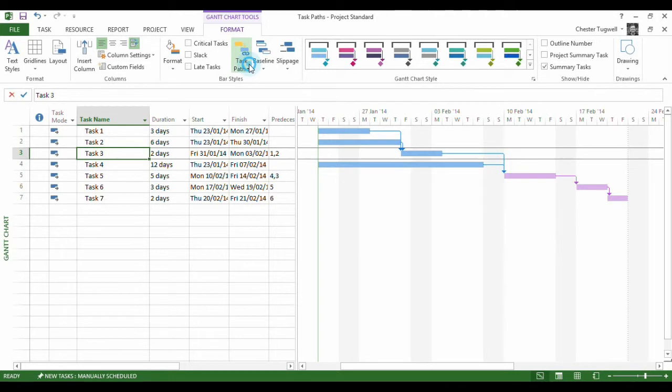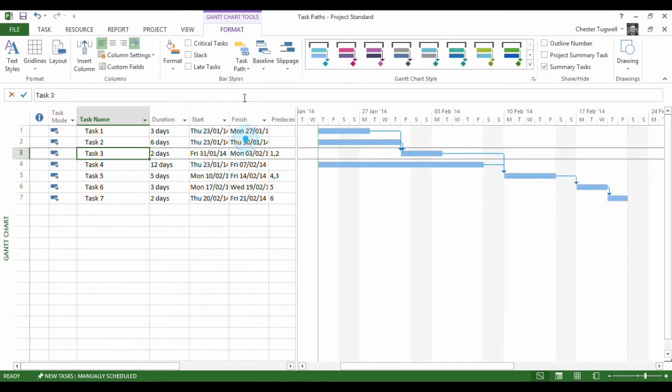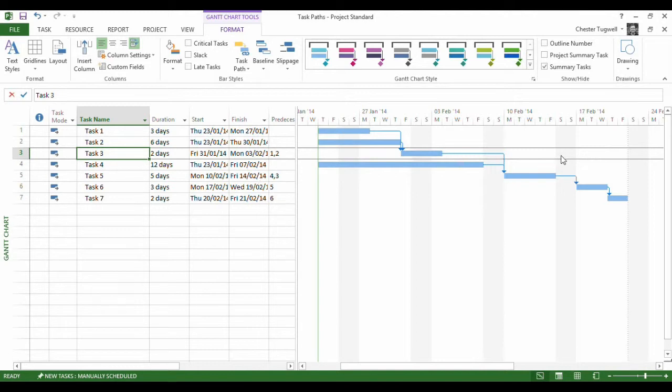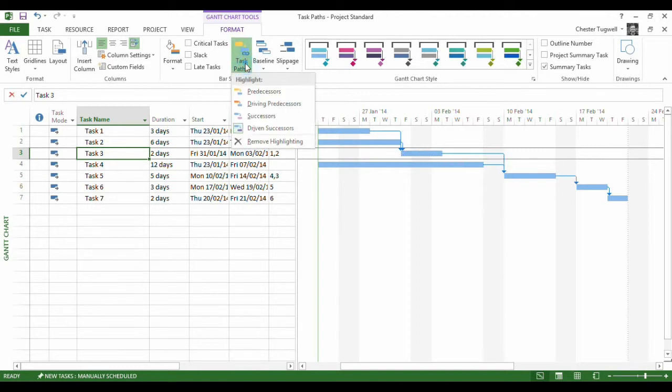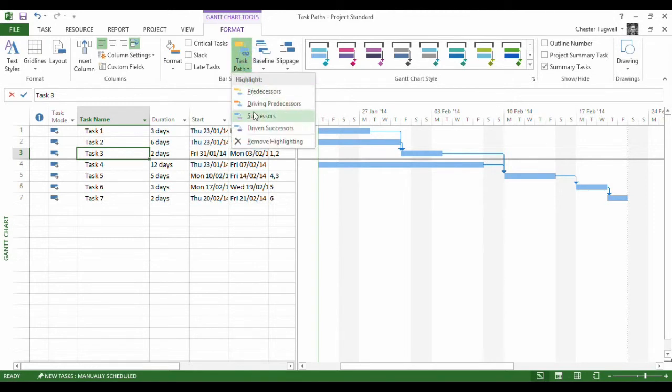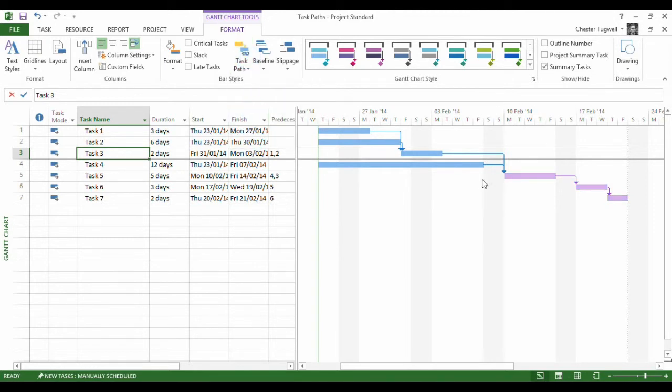Now, what happens if I go up here and say, let's remove that highlighting and let's go for Driven Successors. Nothing. No Driven Successors for this task. There were successors, but no Driven Successors.